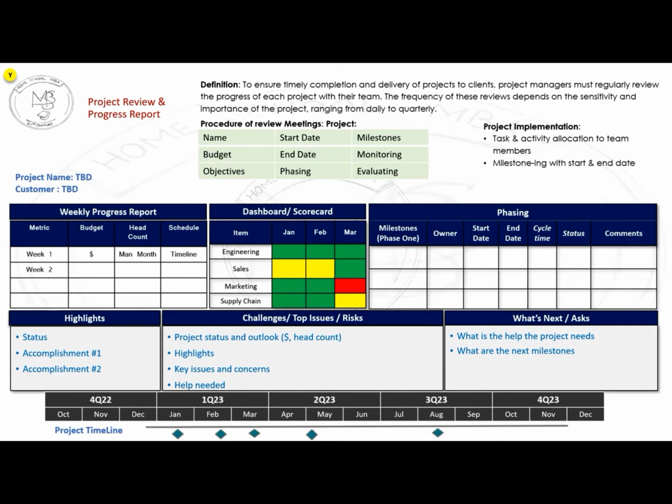These are all recorded in minutes, and these minutes are signed by the participants so that it becomes a document for the future. So that serves the next time when you are having the next meeting: the previous minutes are read before, and you would understand what the problems were and how you discussed them and things like that.